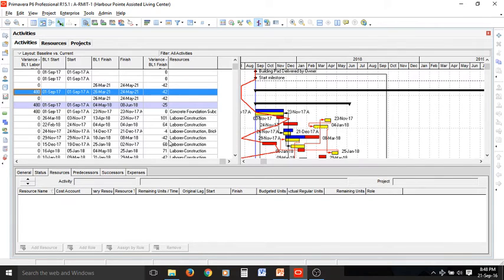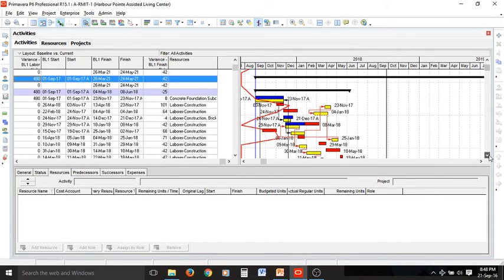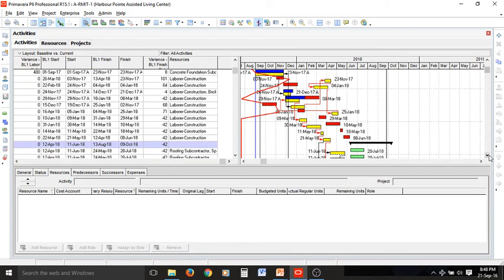The actuals are now entered for our project and the slippage can be seen here. Some of the blue bars are to the left of the actual activities, showing we are behind schedule. This situation can be improved by crashing the project and assigning new resources or overtime.